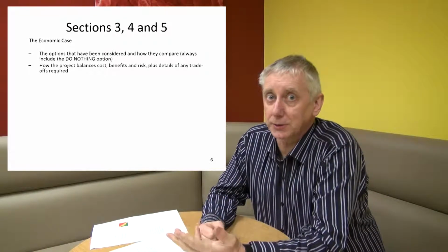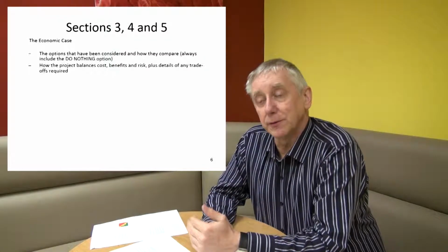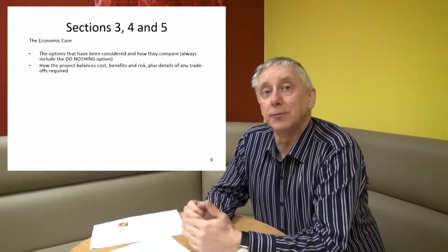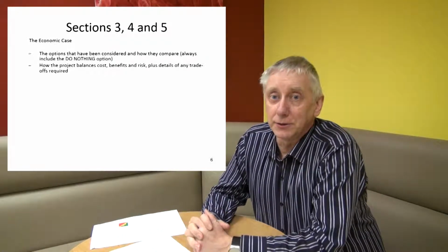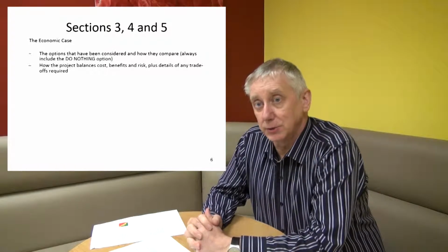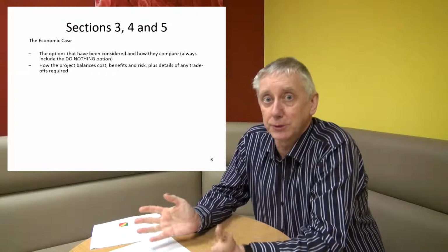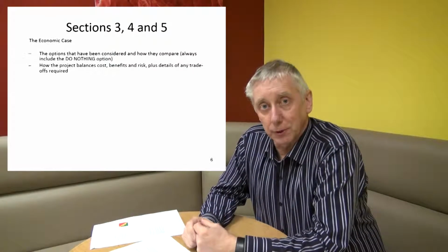The numbers stacked up, but what they failed to do was to articulate the damage that would be done if nothing were done. And because of that, the decision-making body simply turned around and said, you've not made the case for change. Your ideas are good, but why should we be changing anything at all? So you must always include the do nothing option.